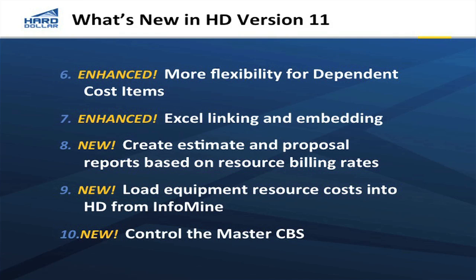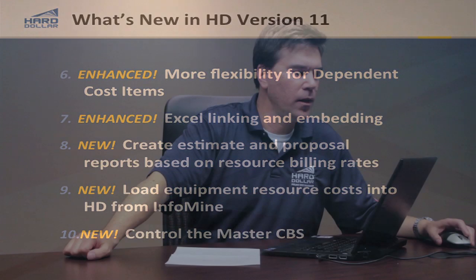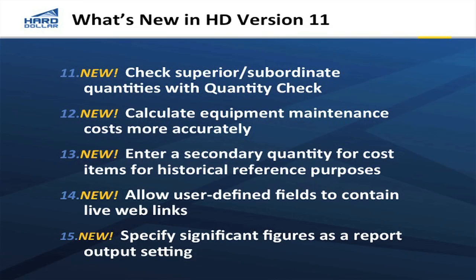We have a lot of new capabilities around our master cost breakdown structure. You can control which items are going to come into every new project automatically — certain overheads, indirects, or dependencies that you want to populate into every new job automatically. We also have the ability to do quantity checks. As we look up and down the work breakdown structure or cost breakdown structure, we can check for quantities that should add up — checking that subordinate quantities add up to the total, to make sure it's functioning the way you would like.